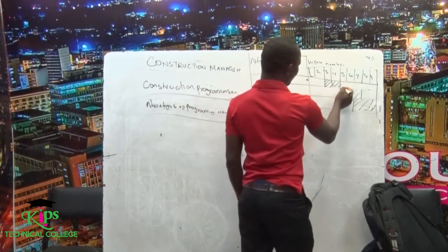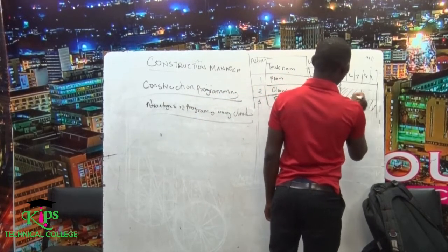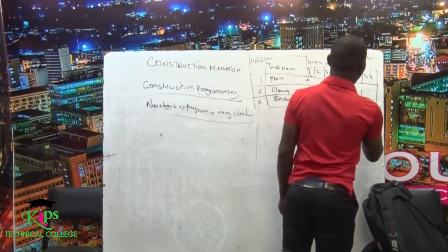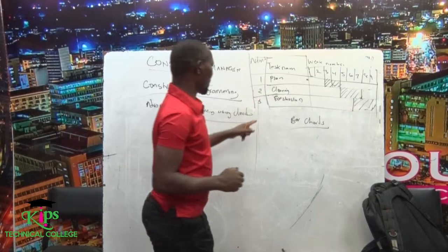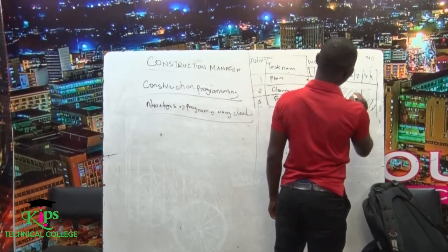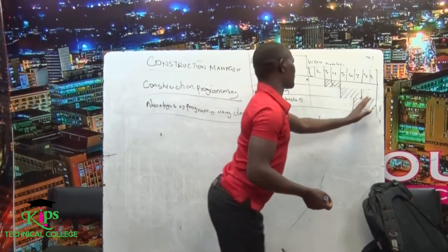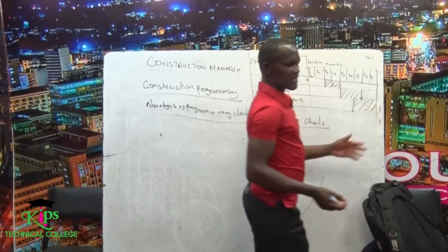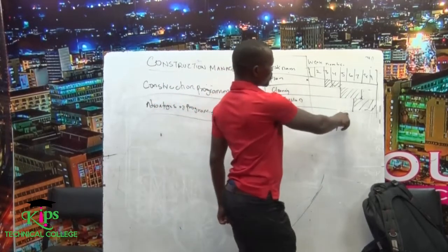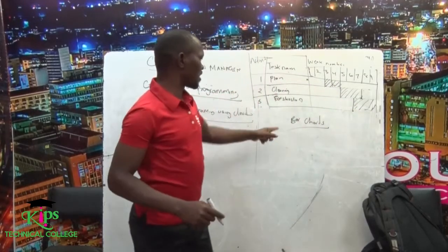After planning, after week 4, we can start the site clearing. We can do the site clearing up to week 7, so we'll finish this activity at week 7. Then the third activity will be construction. We'll start our construction at week 7, because after clearing, at least most of our site will have been cleared. So from week 7 to week 9 we can do this activity.